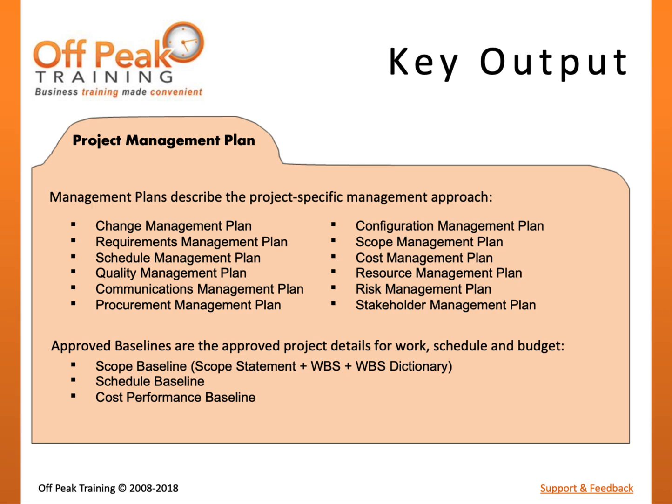As with most of project planning, this process will be required early on in the project lifecycle. However, the project management plan should be revisited and updated throughout the project lifecycle, particularly as the project team transitions from one project phase to another. In addition to the many subsidiary management plans, the project management plan will also include the 3 approved project baselines. The scope baseline will define the approved project work to be completed. The schedule baseline will define the approved schedule of work, and the cost baseline will define the approved costs for project work.